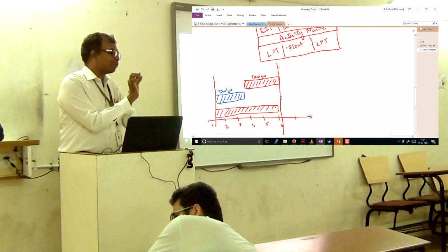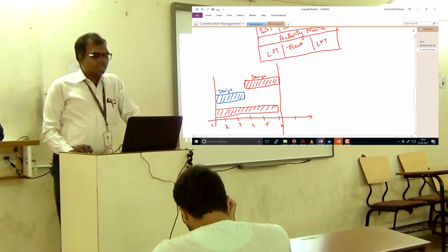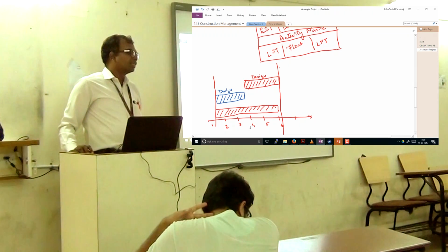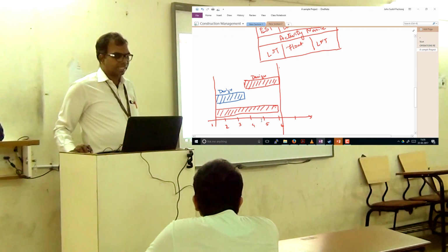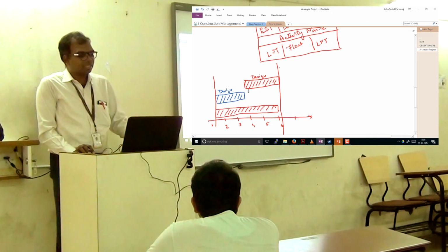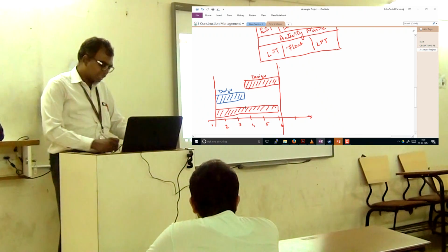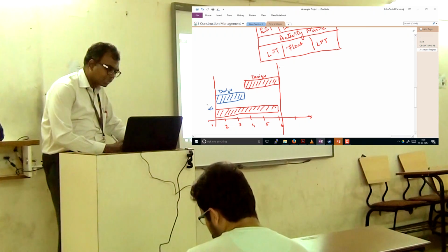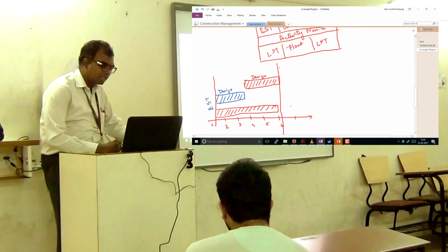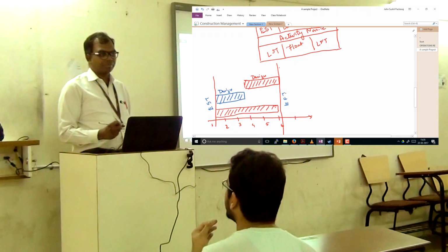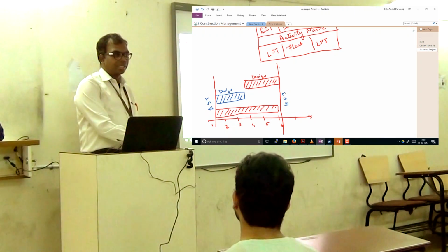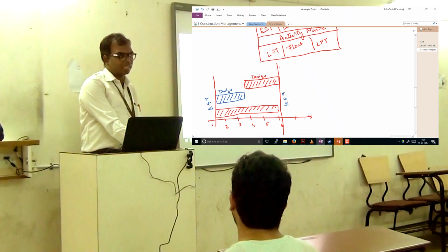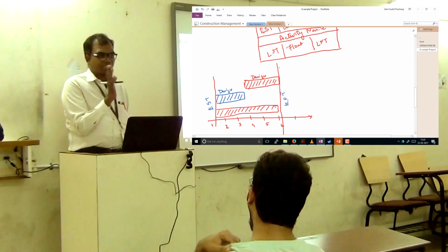Now the point we are trying to make is, I got a free time between the design and the procurement. Suppose I got a non-critical design. Then I can try and shift this to any place between these 2 lines. This line will be called the early start time, and this will be called the early finish time. Earliest I can start this activity is at this point. I can finish this here, because if I move this from the early start time, the next activity is going to get affected.